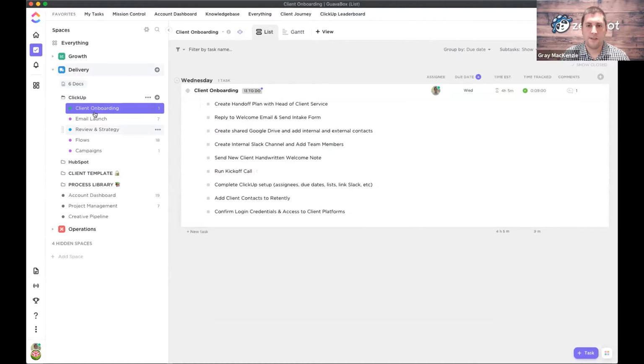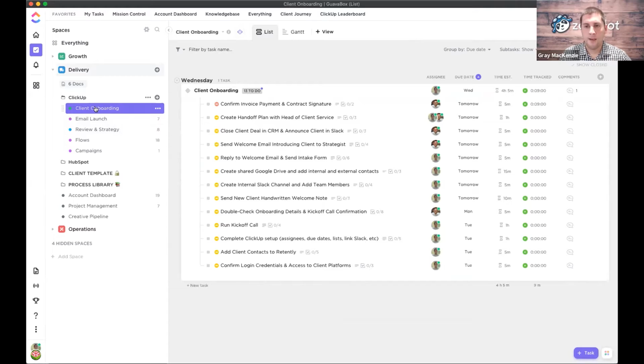And if I click into one of these lists, the client onboarding one will start here. So we take each specific task that happens here and say, this is a deliverable. Or, it's fine to call it a task, but think of it as something that you're delivering, a milestone, potentially, as you're putting it in here. But this task is essentially the high level deliverable that needs to happen. In some cases, these will be distinct and be on their own. But using the layer of hierarchy that goes one more drill down here into subtasks is super helpful for organizing your work. So what we'll then do is we'll take each subtask, and each subtask becomes the individually owned task that needs to happen to complete that deliverable.